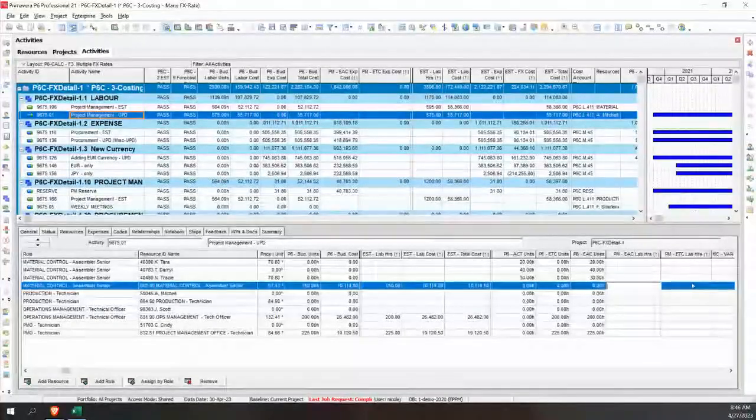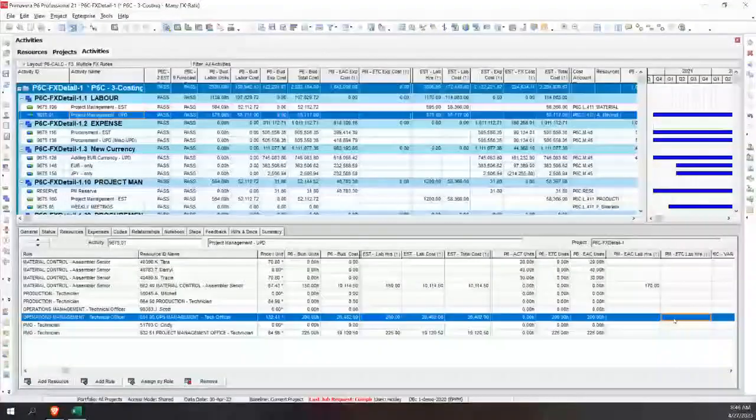So the PM can say, well, we've got 90 hours so far on this, and my at completion, so how much I think we're going to spend, might be over the 150. So in my example, I might say we're going to trend over. Now I can also estimate the remaining, the to complete. So you can do it either way, whatever way makes sense, and it can vary. So you want to give the team the flexibility.